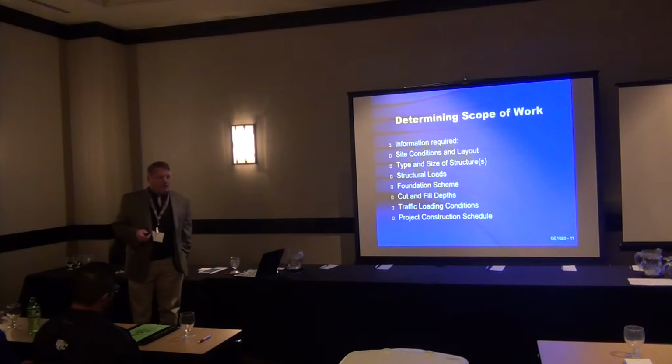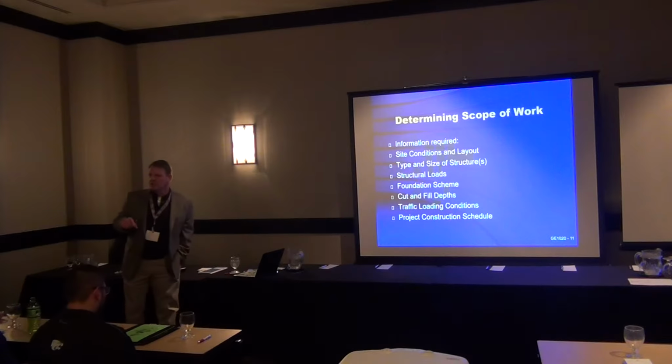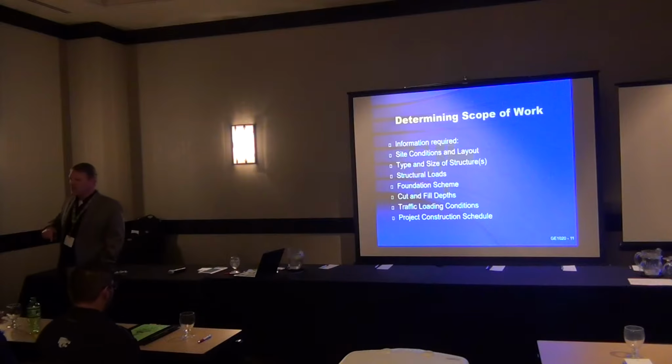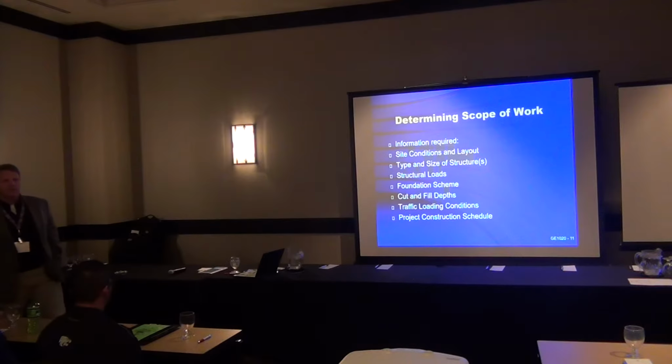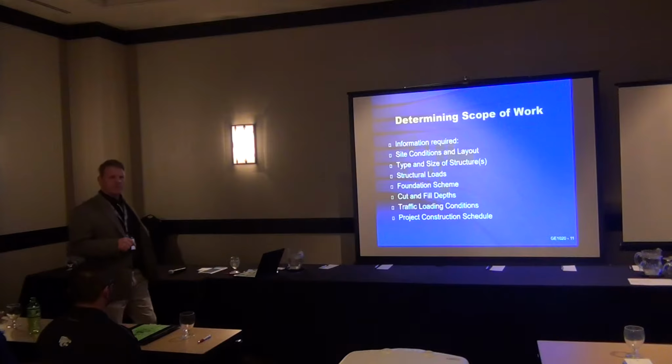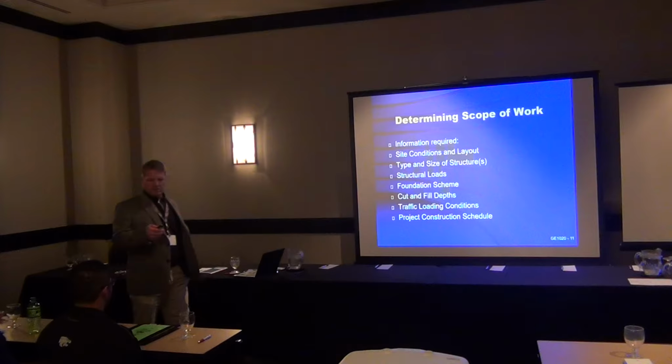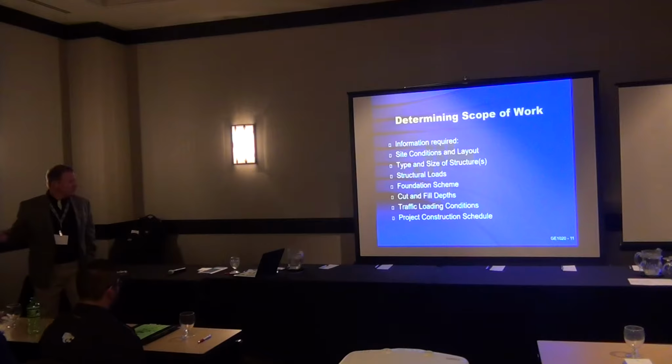I've got a project I'm working on right now where the entire schedule for the entire development, a 275 acre development that's got almost 2 million square feet on it, is driven by the settlement caused by the deep fills. Everything the contractor does has to be sequenced in such a way that we make sure that the new fill that we placed has consolidated the softer soils underneath it in such a way that the building performance will be acceptable. So it matters. What are you doing about traffic?